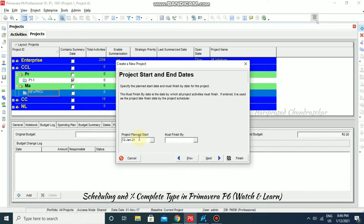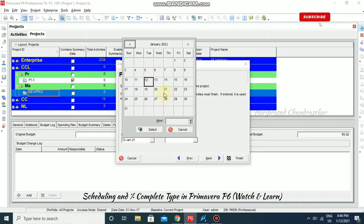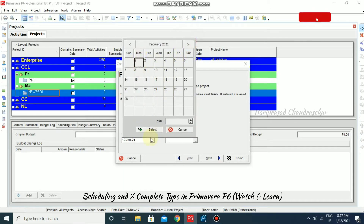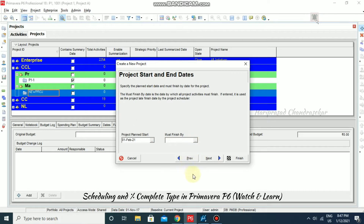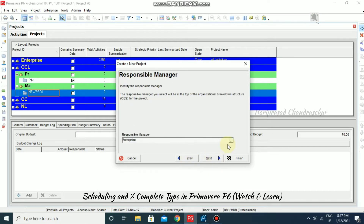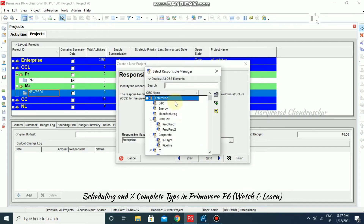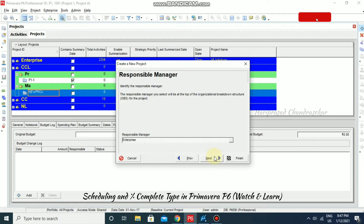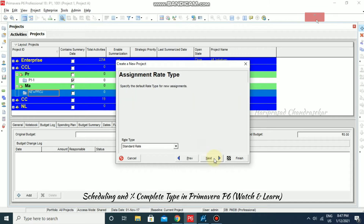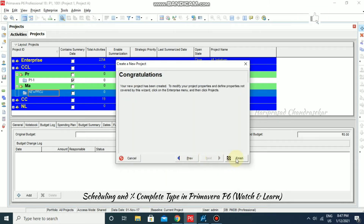The project planned start date — I'm going to set it to February 1. Going next, the Responsible Manager can be selected from our OBS list. By default it is Enterprise, so I'm just going next. The standard rate we can choose, then next and finish.